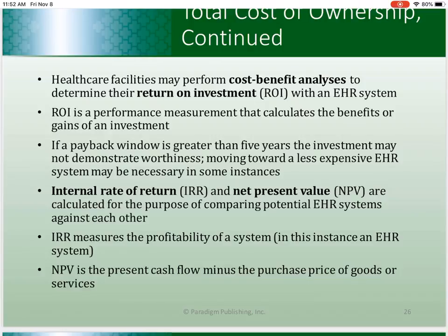So your return on investment is a performance measure that calculates the benefit or gain from an investment. They'll need to pinpoint the payback period by comparing cash flow, which is cash inflow minus your cash outflow, with the cost of the investment to determine how long it's going to take to achieve a positive difference. If the payback period is longer than 5 years, then it may not be worth it.